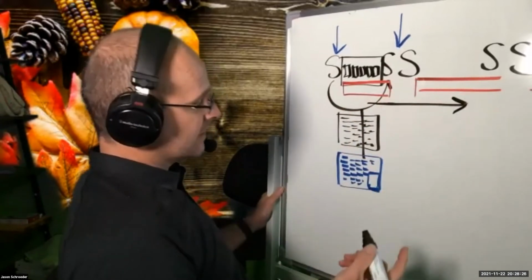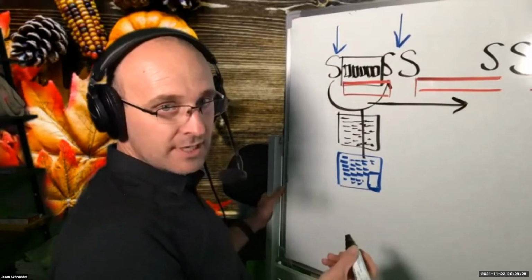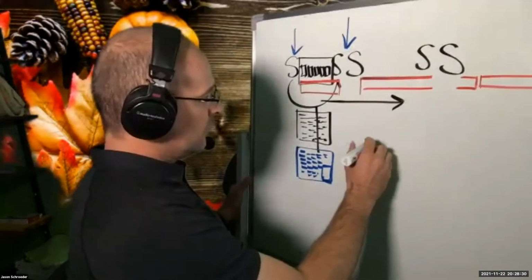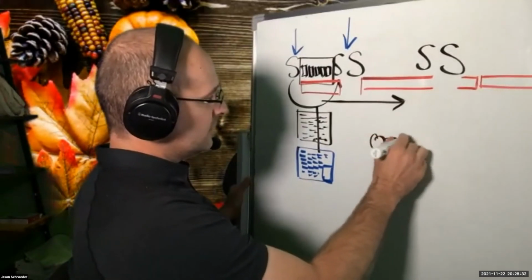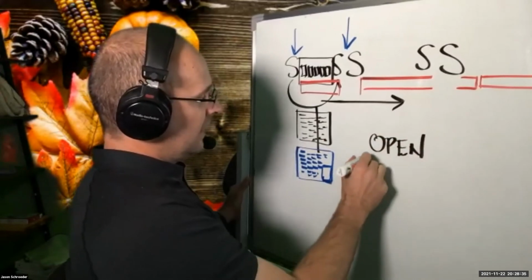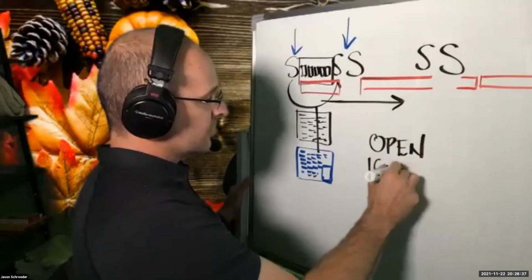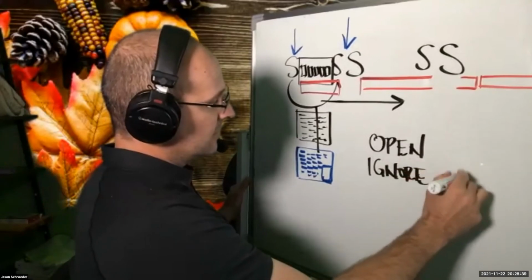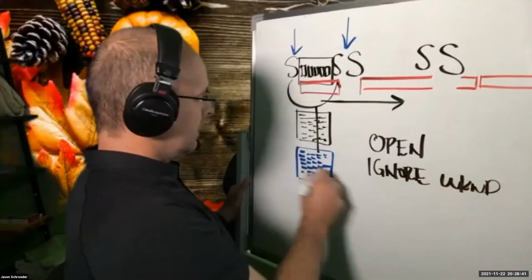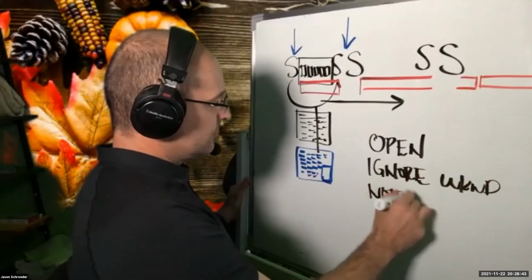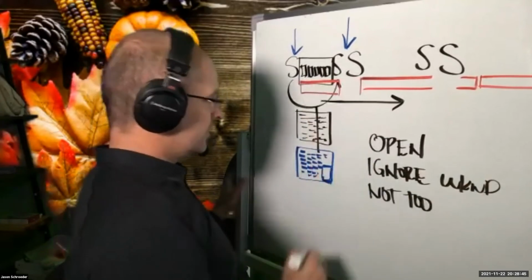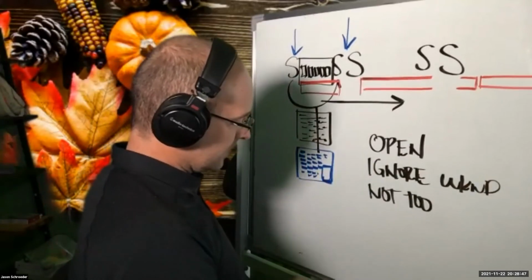And so, like I said, to counteract that, usually in trainings, and I did this in Mexico, I wanted people to be open to other Takt times than 5, and to sometimes, at least when they're starting, ignore the weekends, right? And to not package it too much if they were going to use the 5-day Takt time between the weekends. It can be problematic.